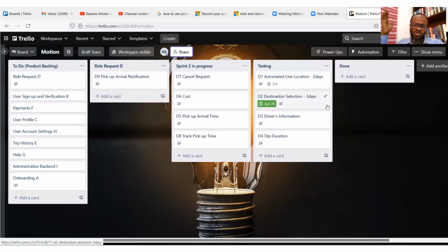Once a sprint is completed, the team here must also perform what we call retrospective, even before they start a new sprint, so that they can perform a historical review of performance, how things went within the 2-week sprint. Is there anything they can do in order to improve on their processes before they begin a new sprint? So remember that sprint retrospectives are performed the moment sprints are completed, all right?